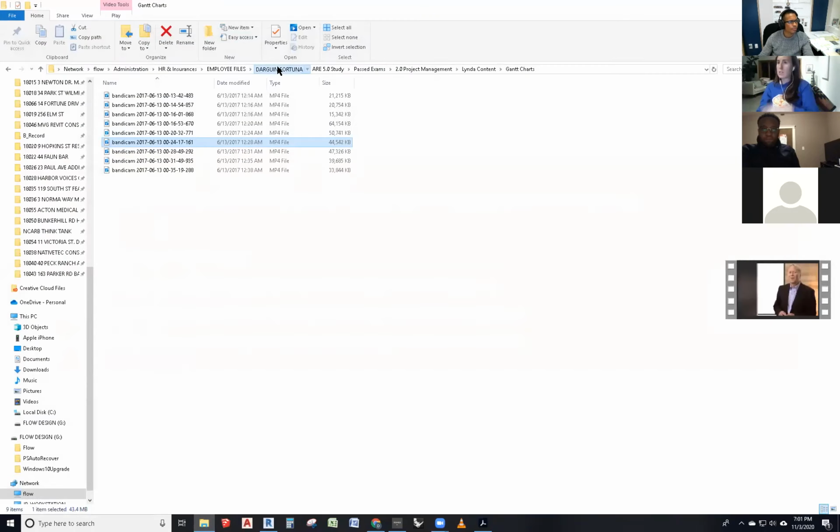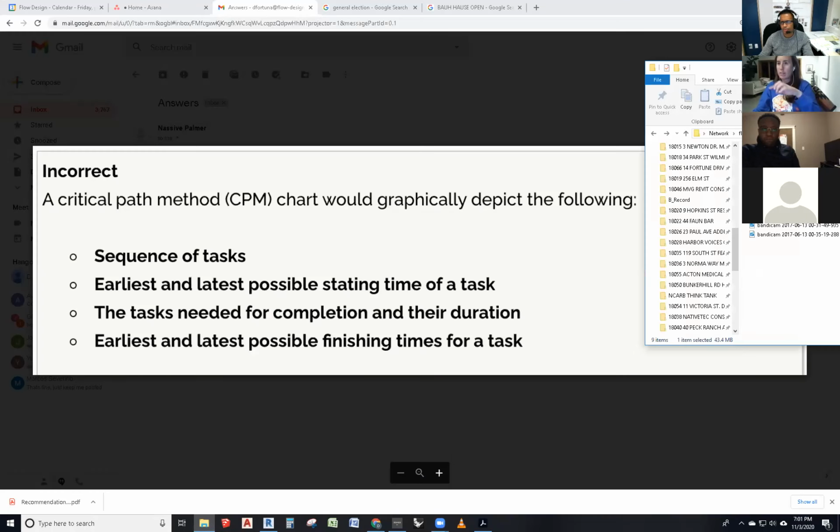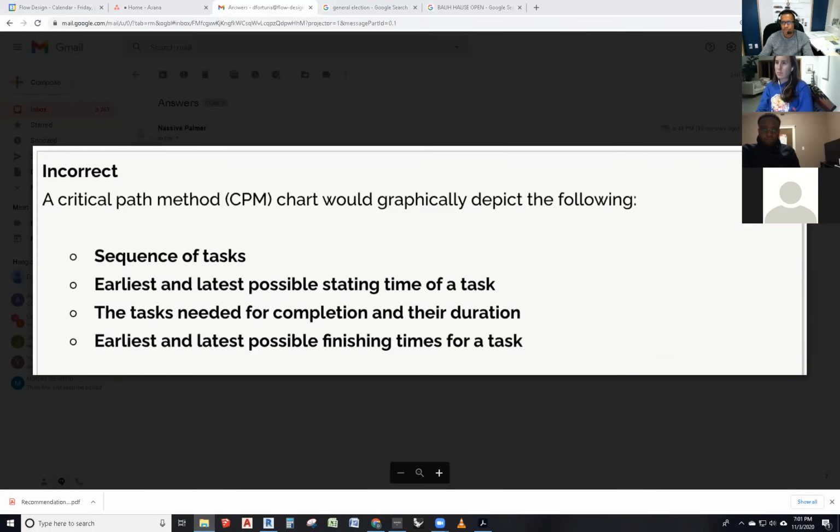What is the longest critical path? And you pick that. I think I had a similar question in the practice when they had to pull a permit. The permit takes 2 months. That was the critical path, 2 months, because they had to do it before everything else. I think now I get it. I think the Ballast practice test has good critical path and Gantt chart questions.